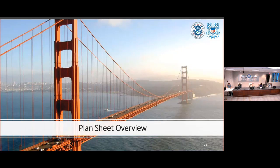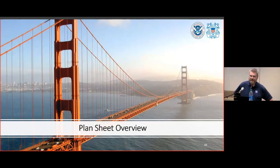Generally, the Coast Guard bridge permit is going to be the final piece of the puzzle. That's going to be the final permit. And yeah, generally it's Corps and then finally the Coast Guard. So any other permit's going to be coming beforehand, and then finally you get the Corps permit, and then we will be following up the Corps very shortly thereafter. So that's the general sequence.